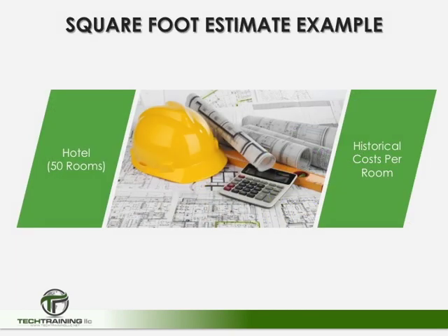So in this scenario, we have been asked for a conceptual square foot estimate for a motel. And again, when you do motels or schools or something of that nature, you can do it per room or per classroom or per unit and so on. So here we're going to be coming up with a conceptual square foot estimate for a motel which consists of 50 units. So one of the first things that we want to do is look up the historical cost data of a motel room.